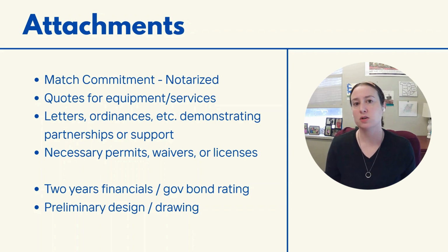But for some of those larger services, it is going to be a good idea to reach out and make sure you know what that cost is going to be and that it's all going to fall within the scope of the funding request. So that can be a formal estimate. It can be an informal bid. It can be proof of past work, that kind of thing.